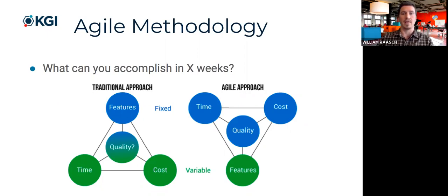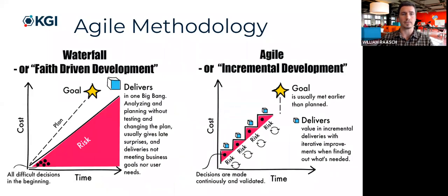That will change the features, but it won't change the amount of time that you spend on a given iteration. Again, we'll talk about that a little bit later, but basically, you're letting the customer and the process dictate how many features you end up implementing in Agile methodology, as opposed to trying to keep that set from the start.